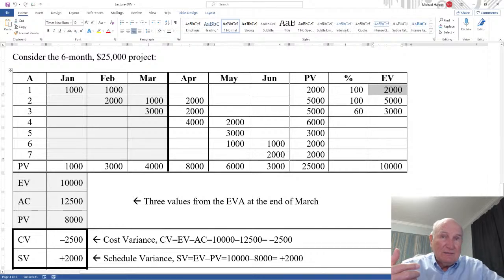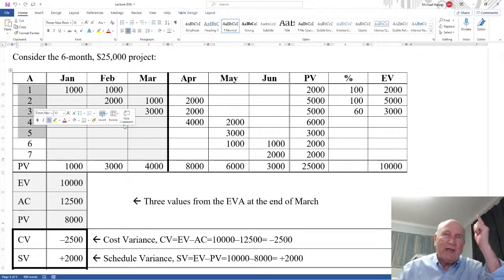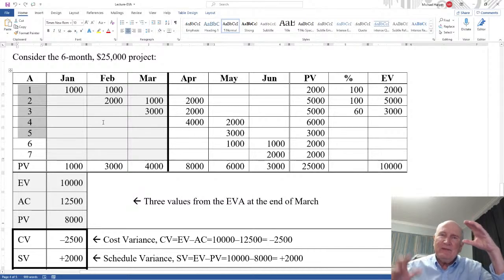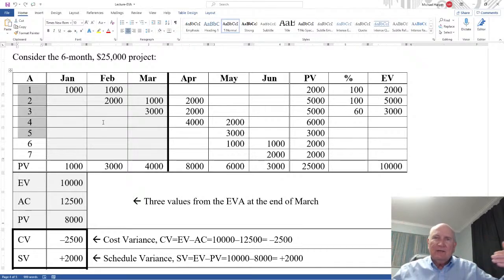And if they're not, then you go back, you redesign the scope to make sure your activities are broken up. Like if all 5 of these is one activity, well maybe that activity is too big. You break it up into smaller activities such that the cost represents the actual work being performed.